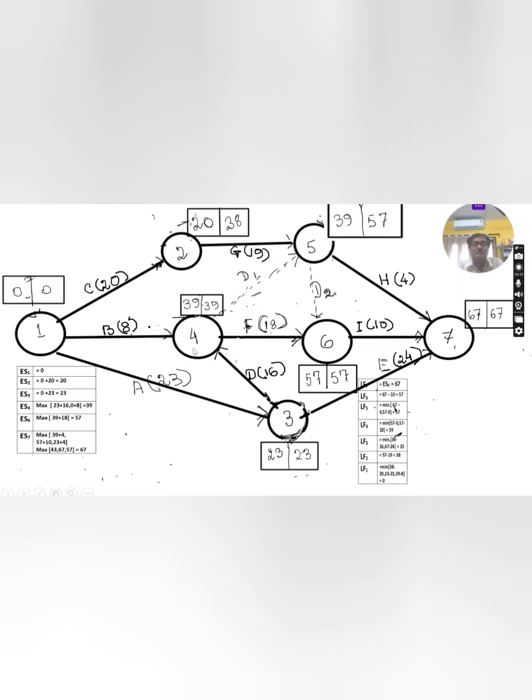to reach this point. First I am checking from this side. 0 is the earliest start time for this, plus 8 days. That means 8 days to reach here. ES4, 0 plus 8. And if you need to complete this task, then the earliest start time is 23.